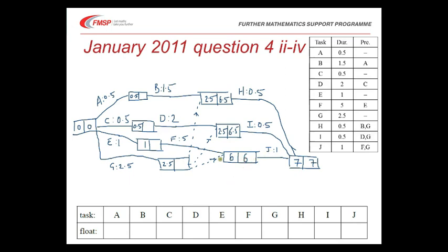Now, looking at when we can work back from here, this is going to be our most complicated one. We can either do 6 minus 0, or 6.5 minus 0. Well, to allow us time to get to this 6 here, we must have got to here by 6.